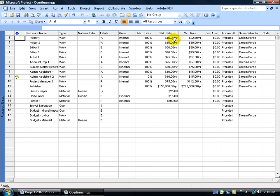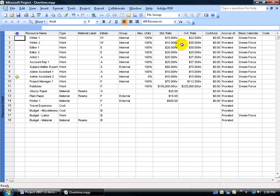Over here we have our overtime rate which if you haven't set up go ahead and do so. It doesn't automatically calculate it for you, you'll just have to punch it in. We have our standard hourly rate for Rider 1 which is $15 an hour. And if we hold to the standard of time and a half then we have 15 hours plus half of that equals $22.50. With Rider 2 it's double time, $30 an hour instead of time and a half.